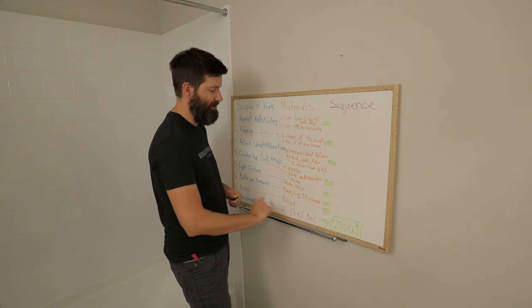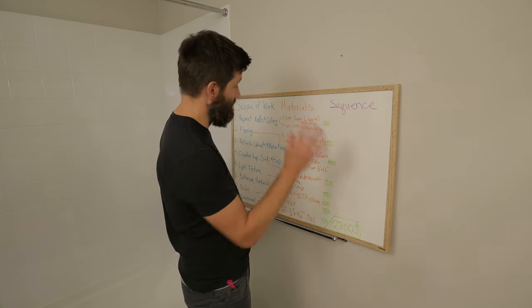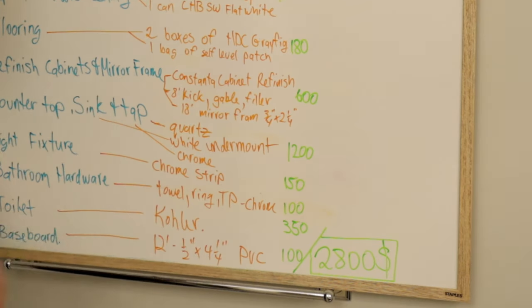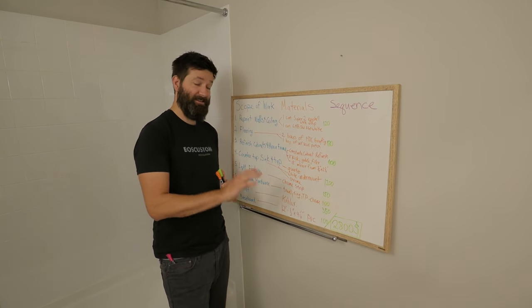So we're going to avoid that with the PVC. I've allowed a hundred bucks for that. So all in all, the whole materials is going to cost about $2,800. So it's probably going to cost more than that. If you've ever renovated anything, that's an estimate.